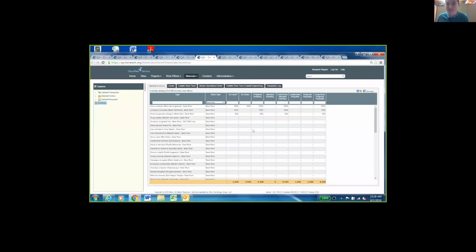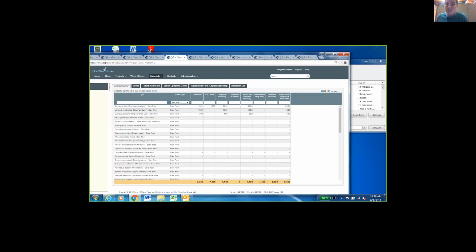There's a lot of information in this inventory page. I spent a lot of time looking at this chart during planting season. You know what you have, you know what you're expecting to still get in, you know the total that you've got to allocate and divvy up. This allocated column represents what we physically have possession of, but it's already been promised to a particular site. Then you've got the unders and overs that tell you hopefully you're in the black and you still have plants, or actually towards the end of the season, hopefully you're nice and zeroed out and you have homes for all your plants.